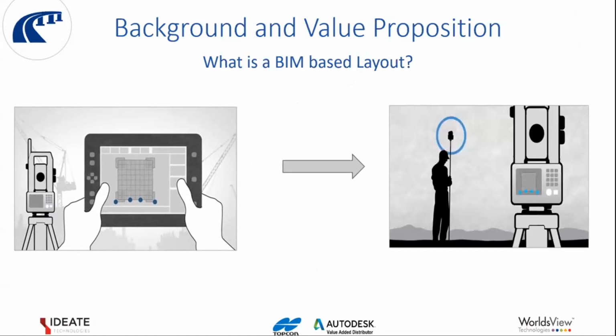This process enables constant comparison of what was done in the field to the design that needs to be done. So data from the model in the office and the surveying instrument in the field can be imported and exported to capture the as-built conditions. Sending data to and from the field in a very short amount of time improves speed and accuracy of installations. Storing positions enables quality control and insurance. So this process effectively bridges the gap between the office and the field.